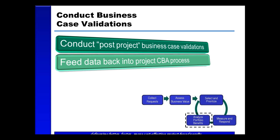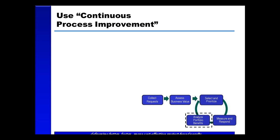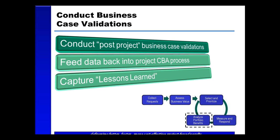It's important to capture lessons learned from that CBA validation process and feed that back into the cost benefit and the proposal stage of the project lifecycle. So if on an ongoing basis we underestimate certain parts of a project, we want to feed those lessons back into future estimates for future projects. There are also other lessons learned that can be captured post-project that can get fed back into the project lifecycle. So the lessons learned step during project closedown is a much recommended step to take.